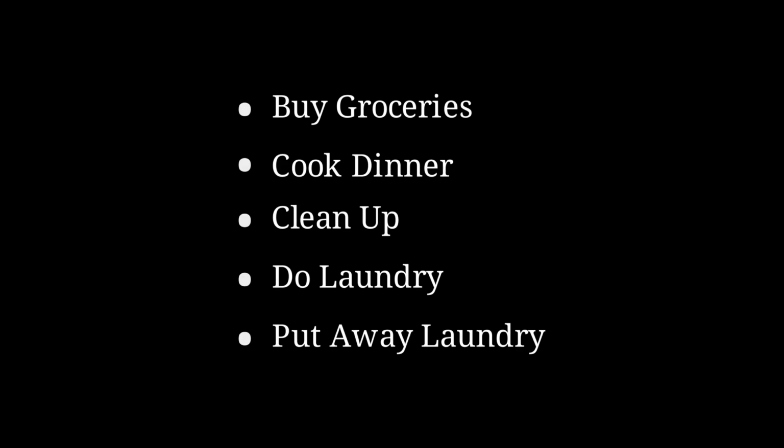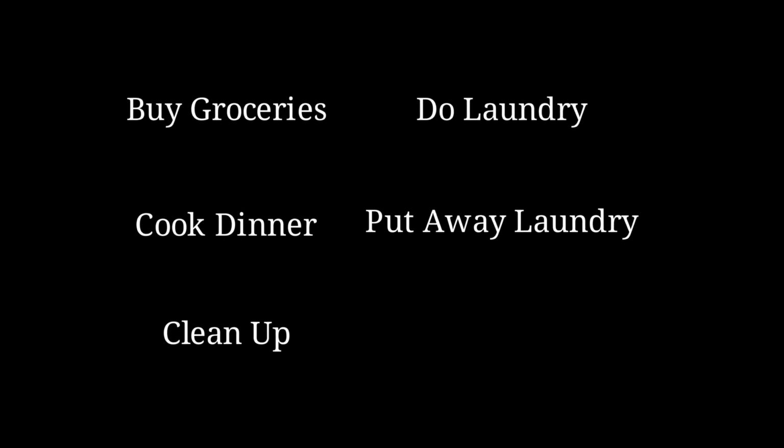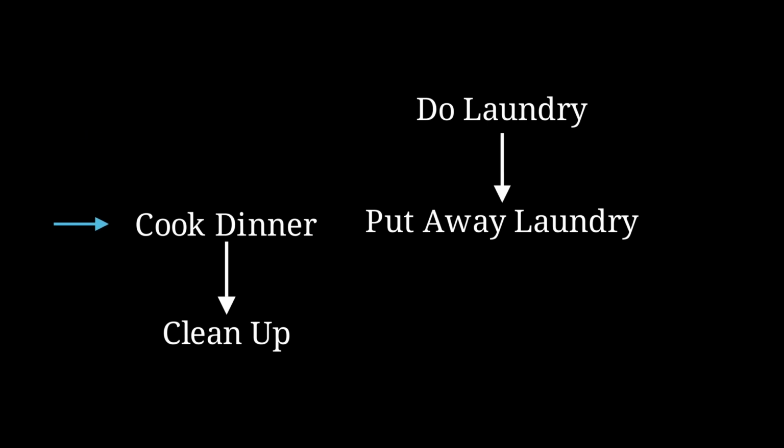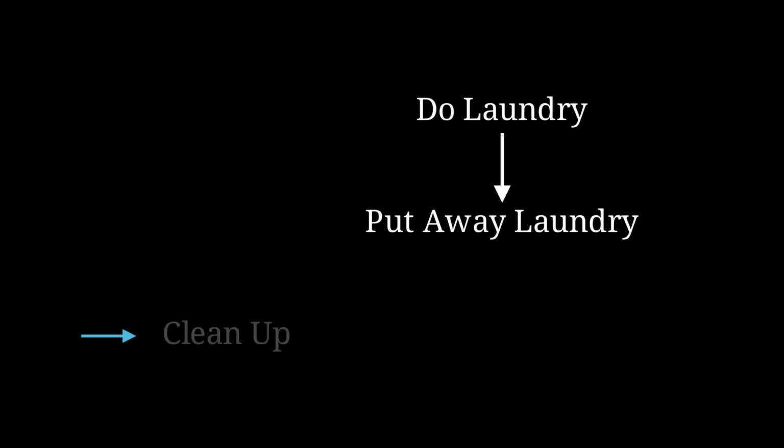Notice that some of these tasks depend on others. For example, you can't clean the kitchen until you cook dinner, and you can't cook dinner until you buy the groceries, and so on. In what order would you do these tasks? Well, looking at the graph, one naive approach would be to pick a task with no predecessors to work on. Once done, remove the task and we repeat, working on tasks and then removing them until we are all done.